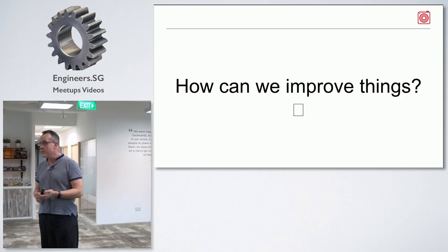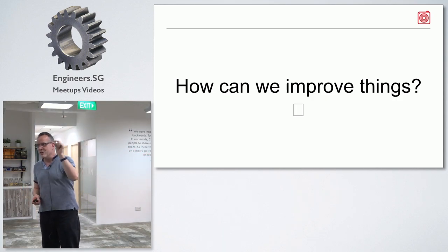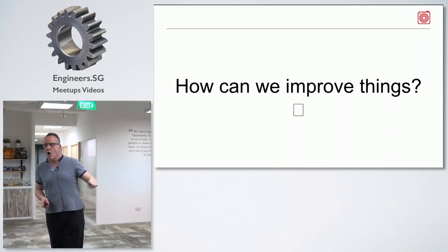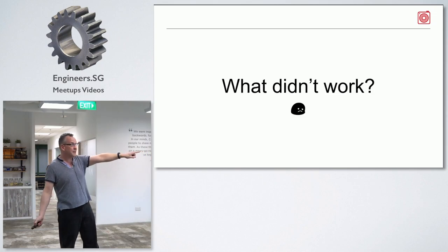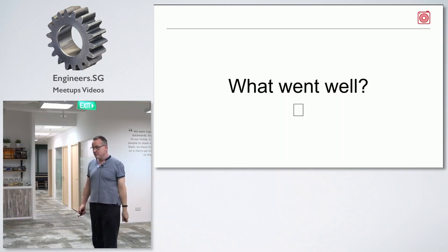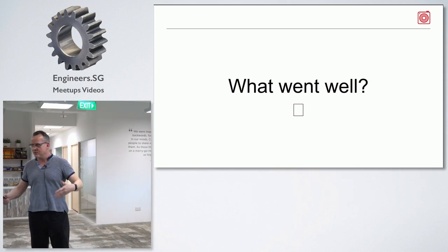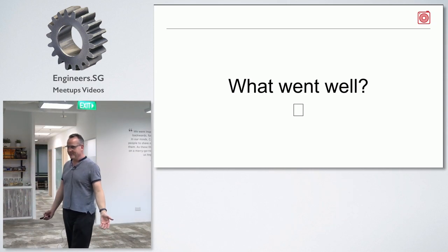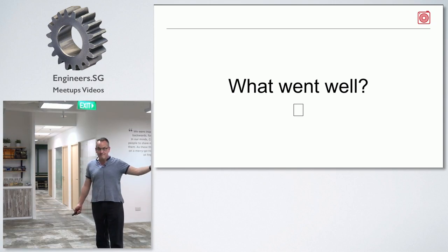And one of the things I really recommend you do, especially for these, is whatever your issue tracking system is, open issues here. If these can be captured as issues, as tasks, then do it. Get them there too. Get Jordan and Stephanie talking to each other so they better communicate. Okay, that might be a task. You know what? Just put it in there. It may seem silly, but hey,